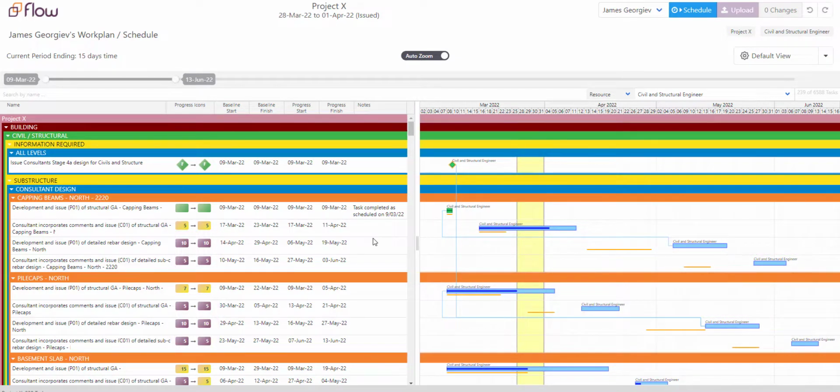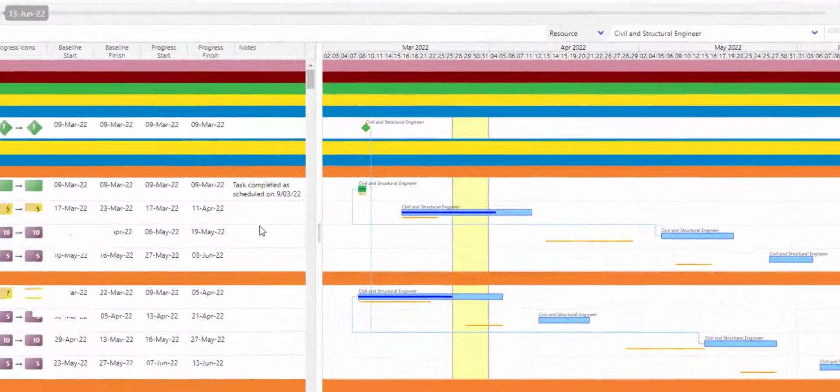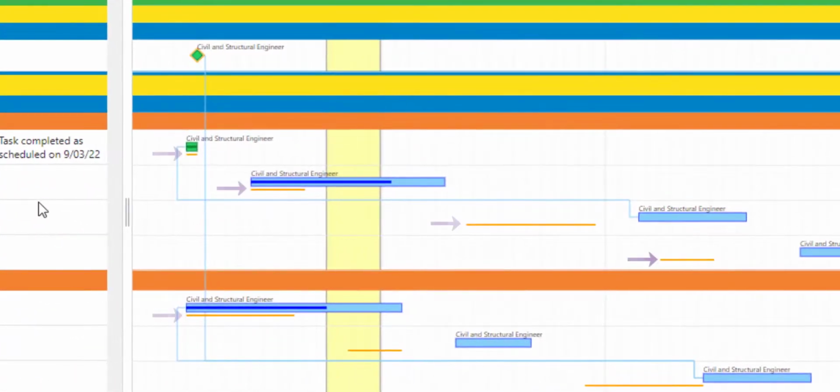Depending on whether a milestone is achieved or not, it will be colored in green or purple accordingly, similarly to the activities. The orange lines underneath the taskbars represent the baseline target dates for each task. Usually, you will aim to keep these as close as possible to the bars, as this will mean that you are on track to deliver your project as planned.